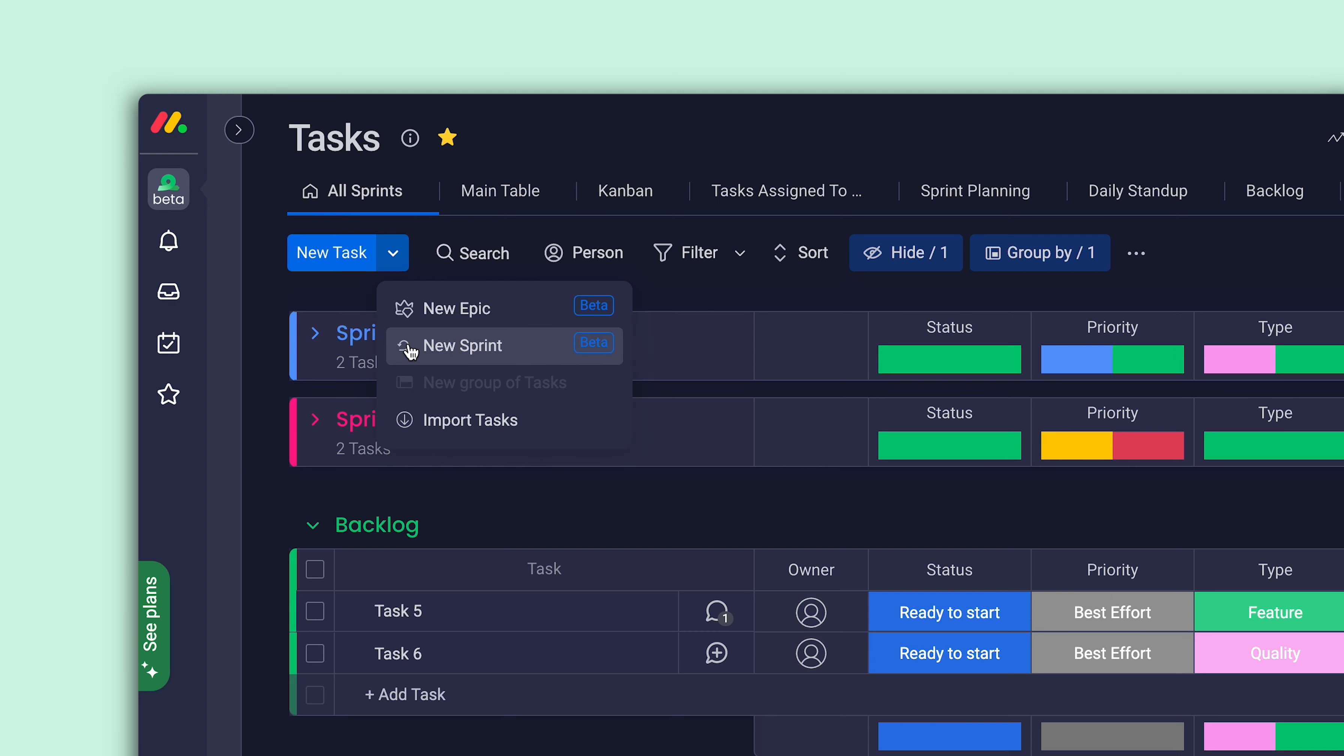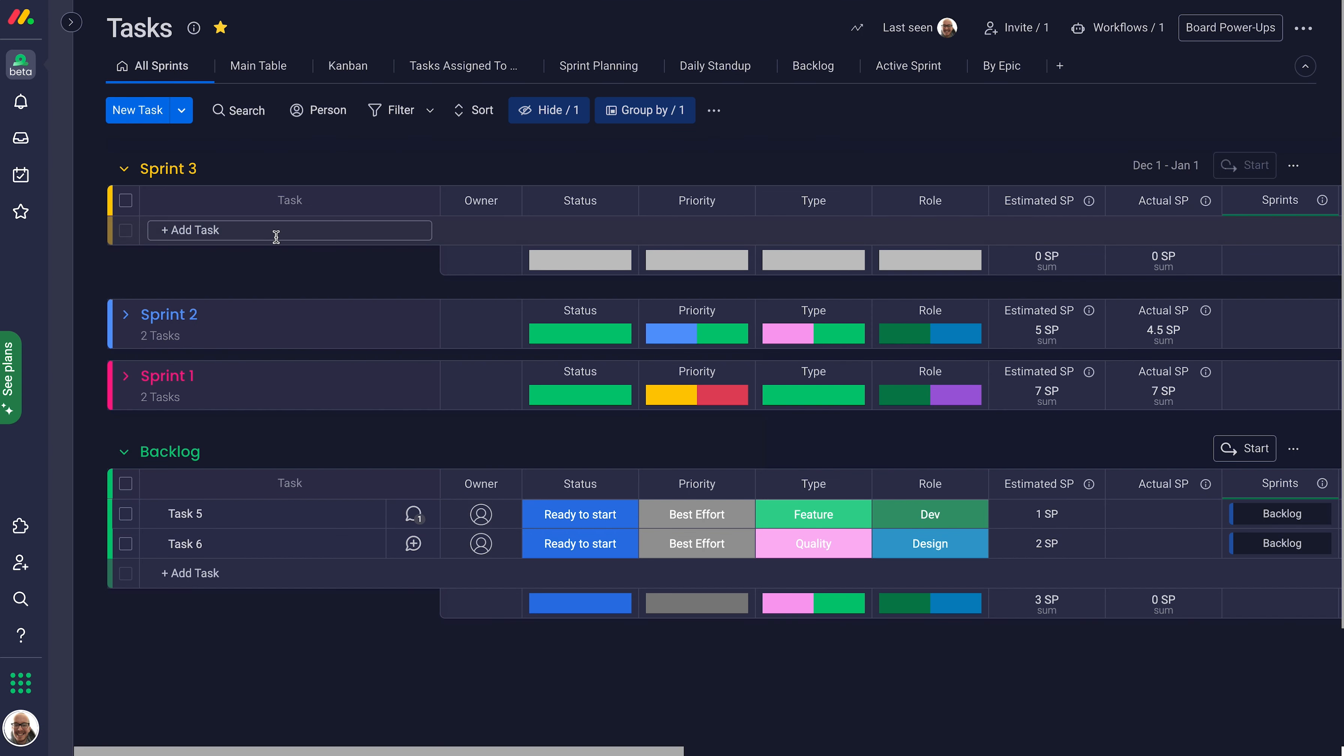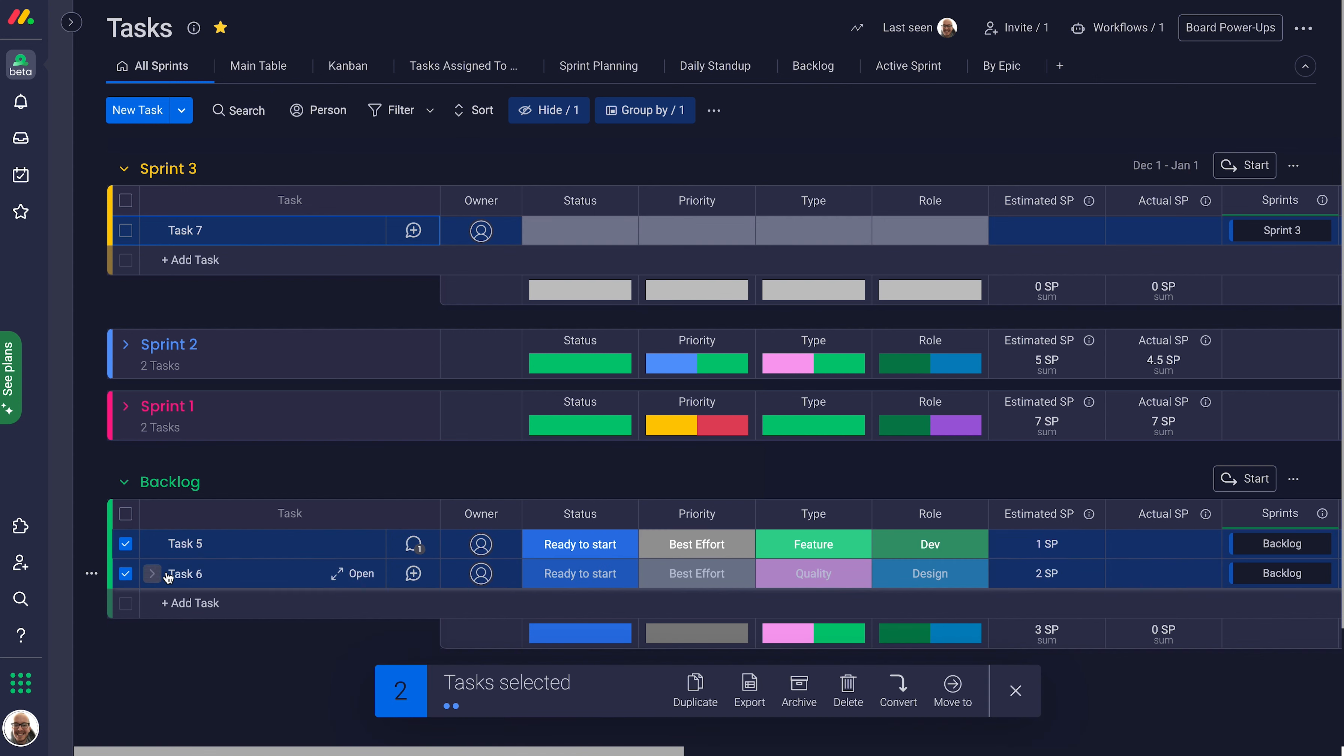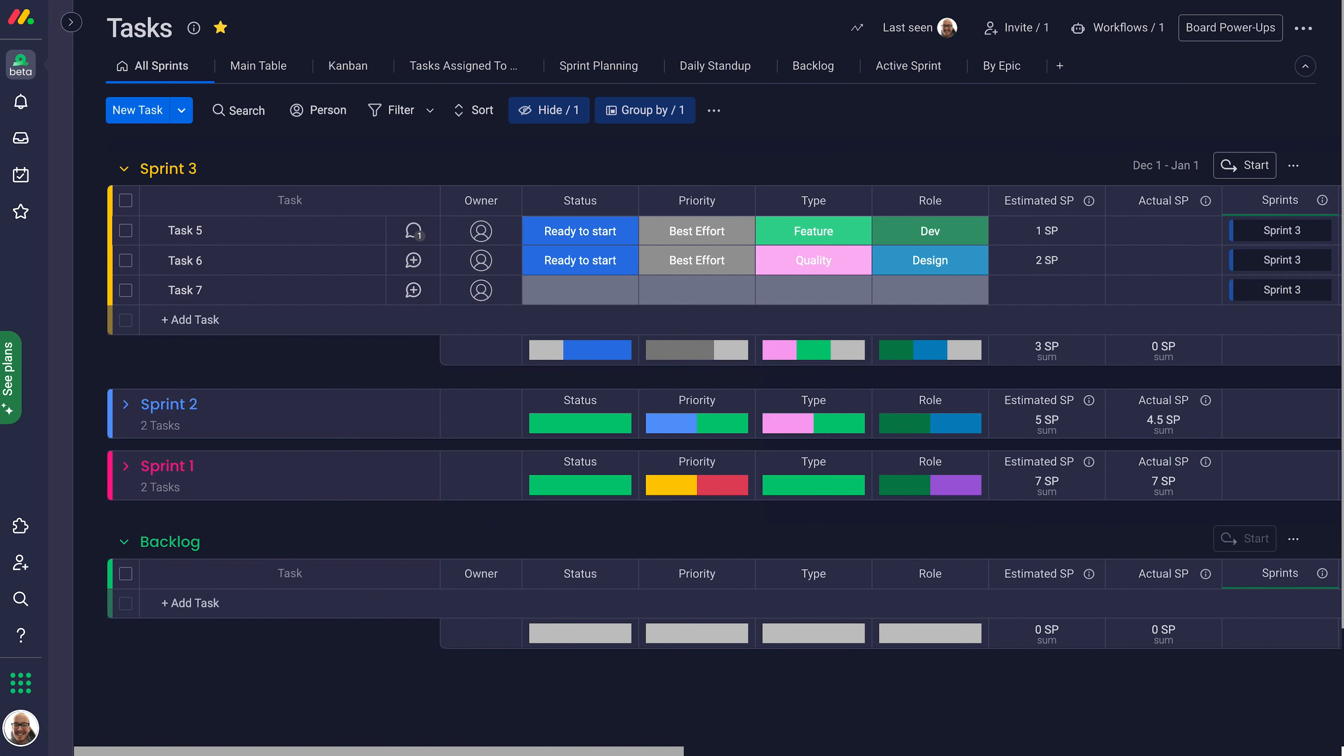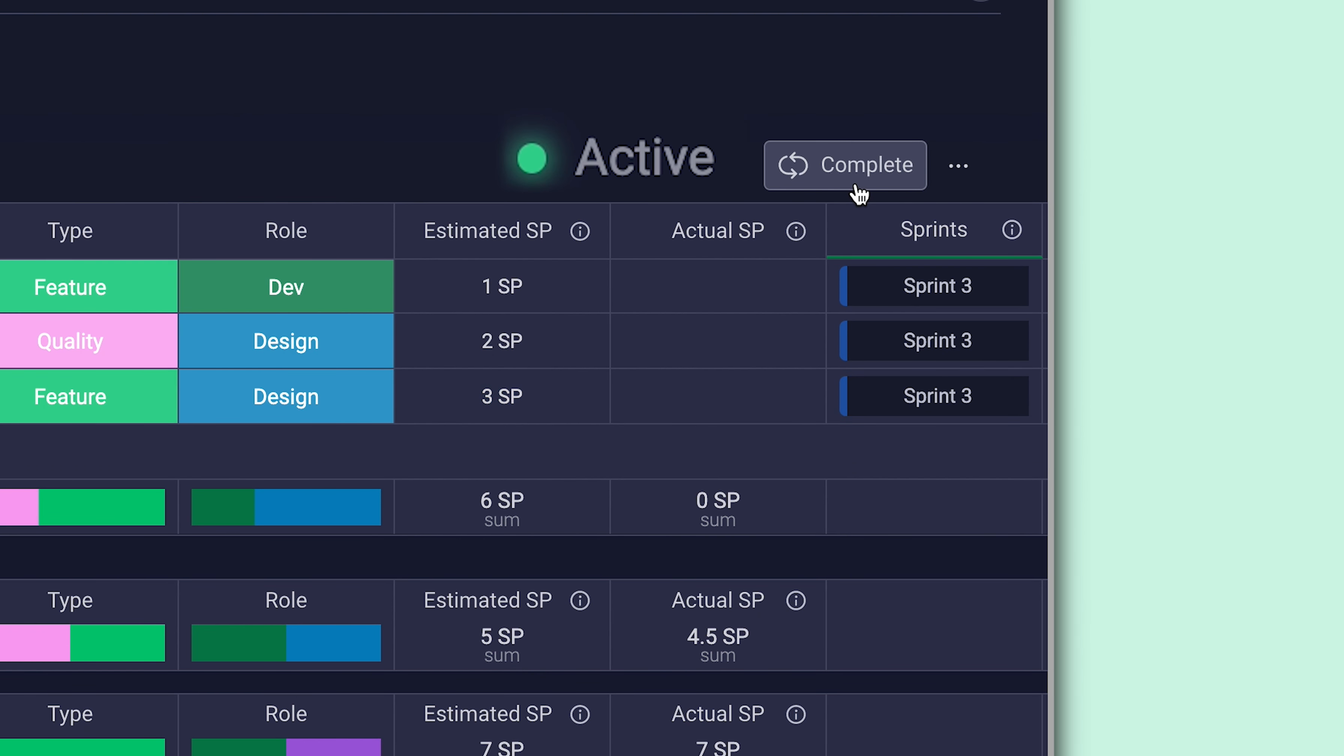Create new sprints from here and add all of your relevant tasks, even dragging tasks from your backlog into the new sprint. Once you've filled out the task details and projected your planned work, it's time to activate the sprint.